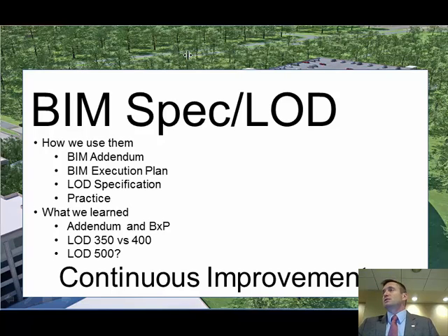And so one of the big things she talks about is the value myth of competitive bidding. Okay? If we go out there and we individually try to address our risk pockets and say we're going to pay for design and get the lowest possible price for design, and we're going to pay for construction and get the lowest possible price for construction, and we break it up like that, we're not getting the best value for the project as a whole. Okay? Let's think about that.